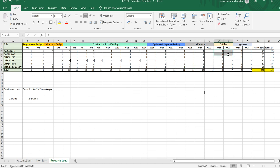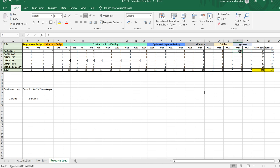During go live, all roles will be present but with reduced numbers. During hypercare, we have the on-site architect, on-site ETL lead, offshore ETL lead, two ETL developers, one QA tester, and one scheduling developer. These people should be available to support during hypercare — if any bugs are coming, they should be able to fix them.